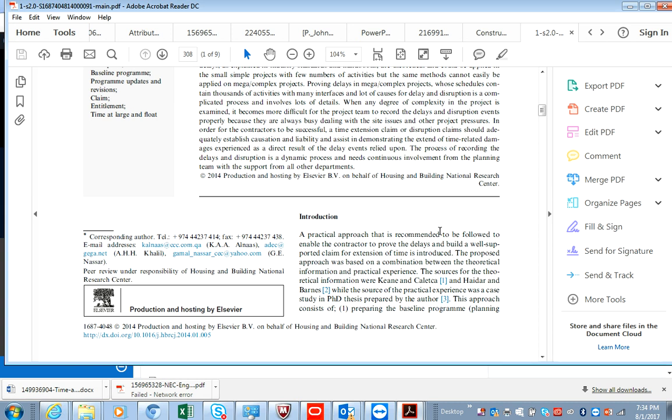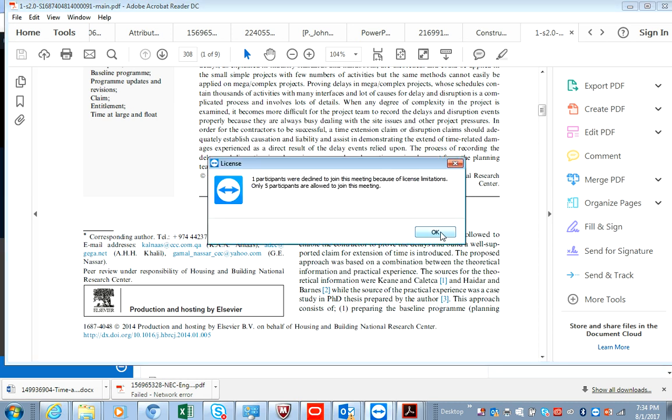Okay, so in the context of a delay, what would happen is you highlight the tasks, you highlight the risks, you check to see if they're on the risk register. If they aren't, you include them on the risk register, a description of the risks, actions to be taken to either avoid or reduce, or the actions to be taken by who or what.